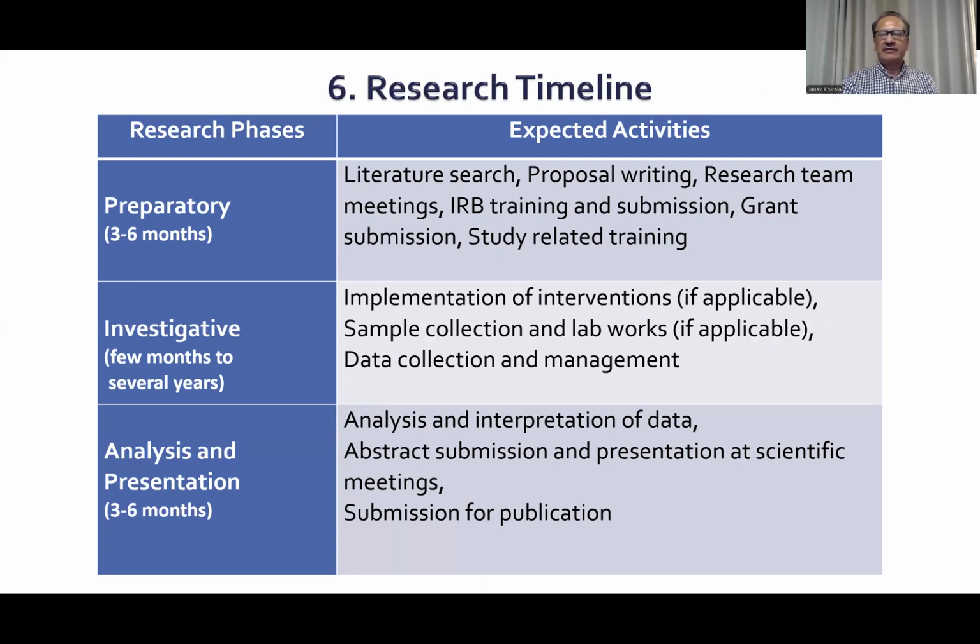Next, coming to the research timeline. Generally, the research is divided into preparatory, investigative, and analysis and presentation phases. The preparatory phase begins with the literature search, proposal writing, research team meetings, IRB training and submission, and then, of course, the IRB takes some time for approval. If funding is needed, then grant submission and waiting for the funding. And if the study requires training, the study team should be trained during this preparatory phase.